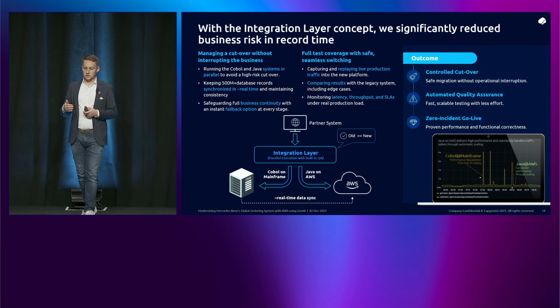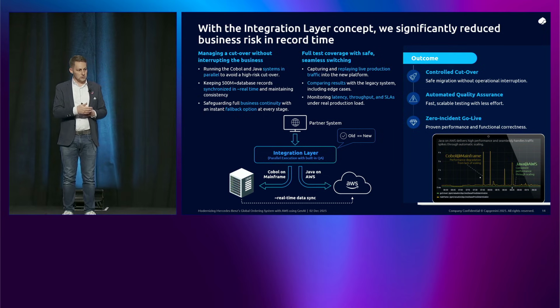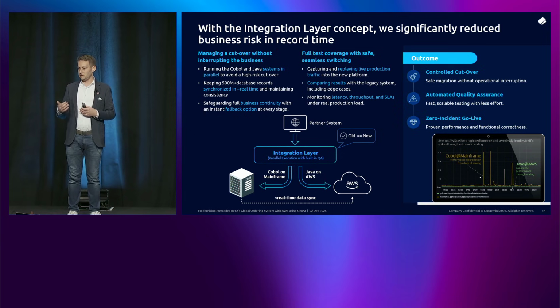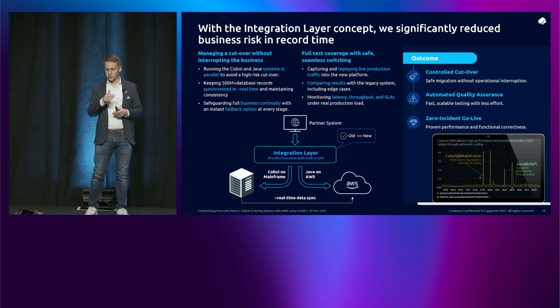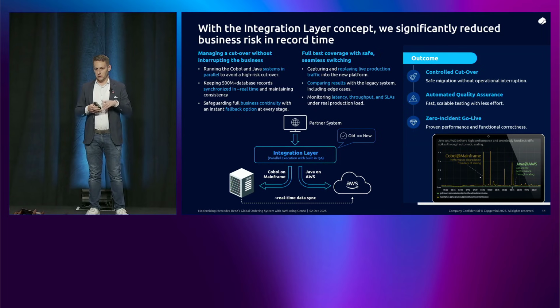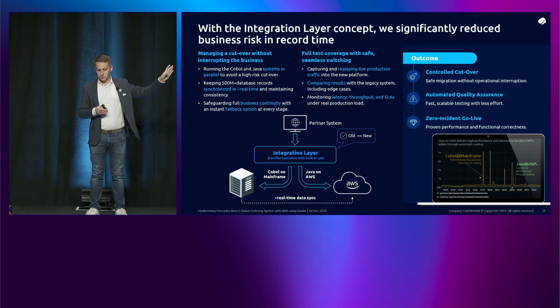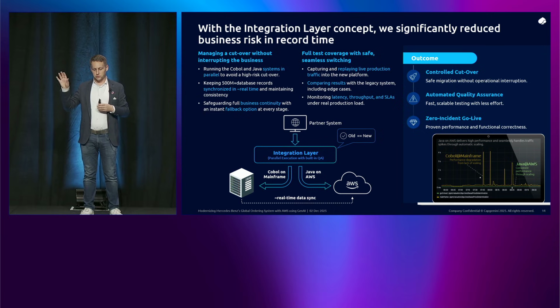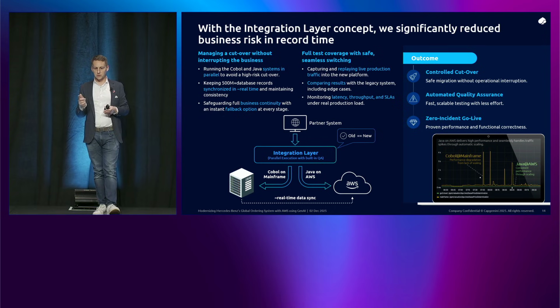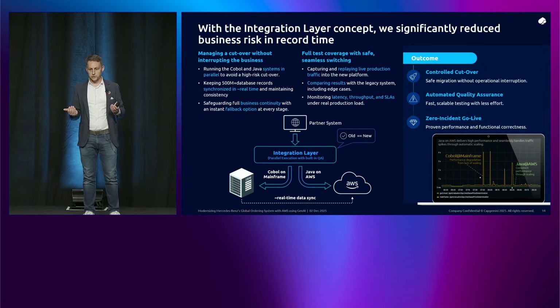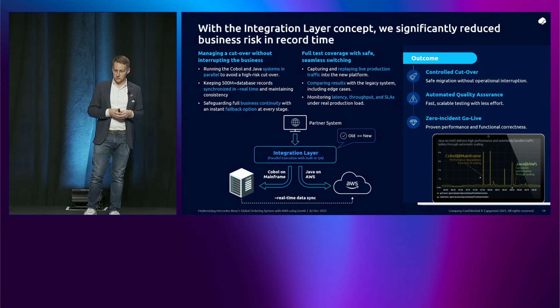While we did the QA phase, the testing phase, the UAT phase, we were always able to use the integration layer and route calls to the mainframe, but also route calls to Java. And because Precisely was still taking care of the database, it was really clear that from both worlds, you should get the exact same result.